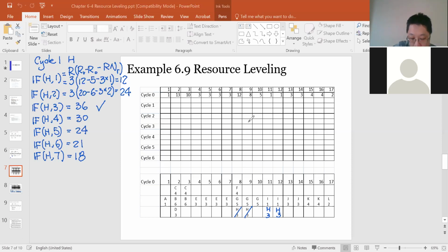After we shift it, we're gonna recalculate my distribution. So the only change is this 3 days. That means for 8 and 9, from the days we vacated, we need to minus those 3 days. From days I occupied, I should plus those 3 days over here. So recalculate this, that's the result for cycle 1 analysis.